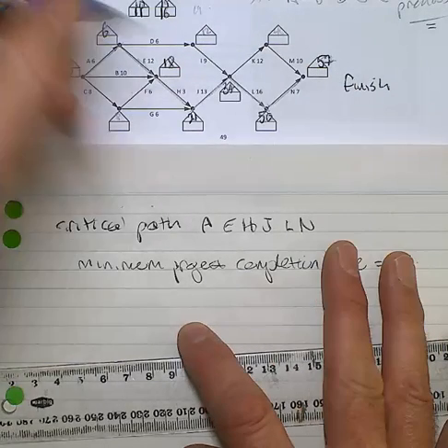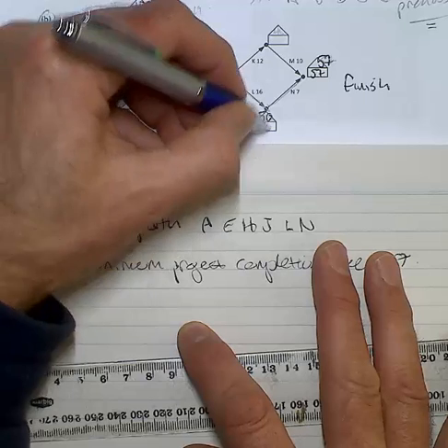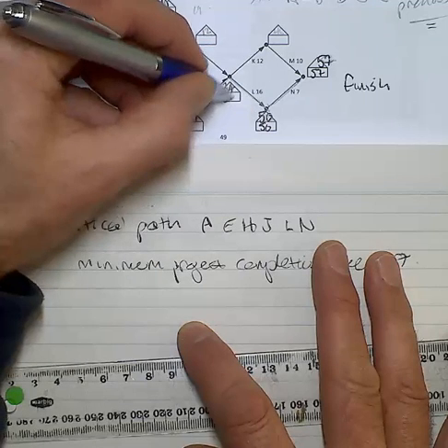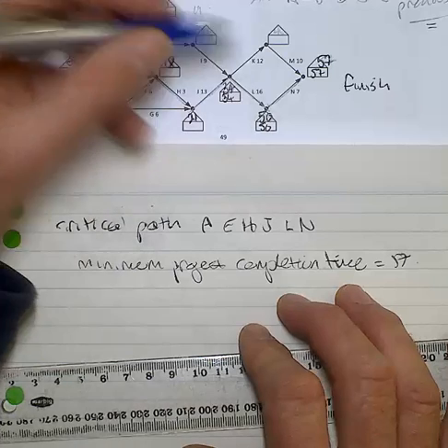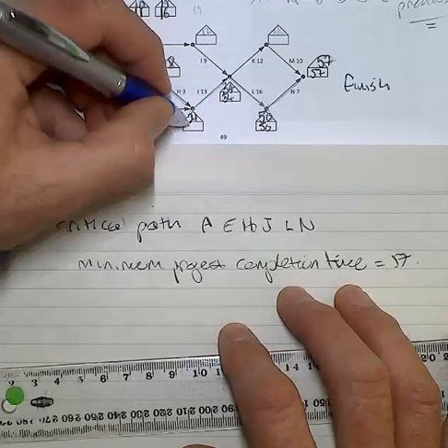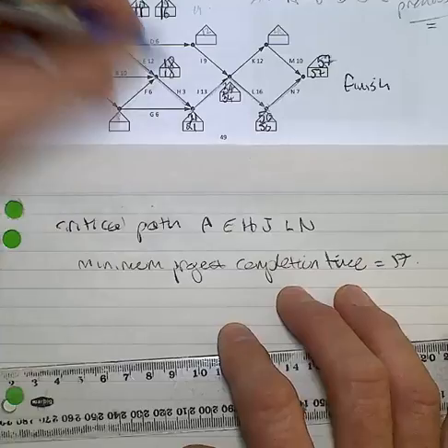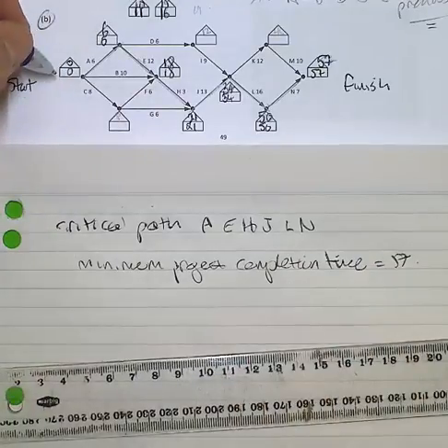The next step, I backtrack. So the latest finishing time, 57, 50. Always the same, the earliest start time for N, the latest finishing time for L, before the project balloons out. I go 21 here, 18, 6, and 0. Always starting from 0, 0.